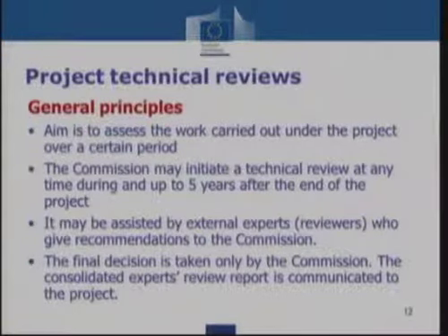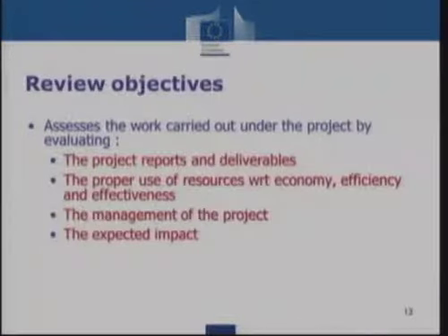Also, a project technical review does not have a free format. There are guidance notes, which are also available to you, including the review report template. Whatever is assessed, you can see that there is the template for the review report, which is also available to you. This is the material which is used by the project officer and by the external experts in order to review your work. It is also the description of work.